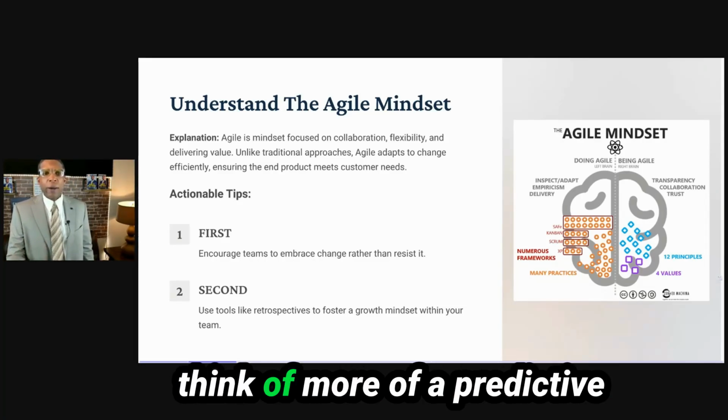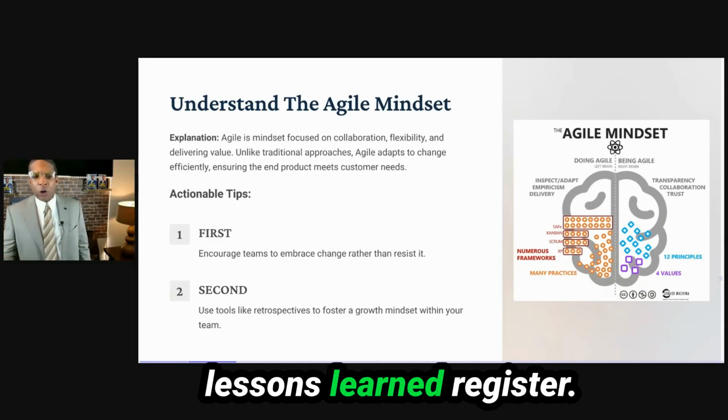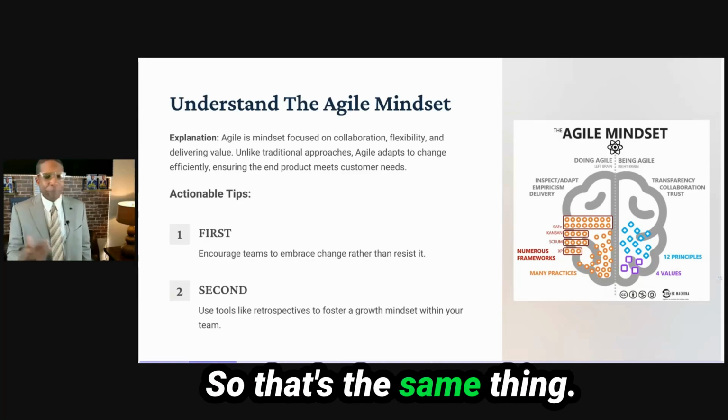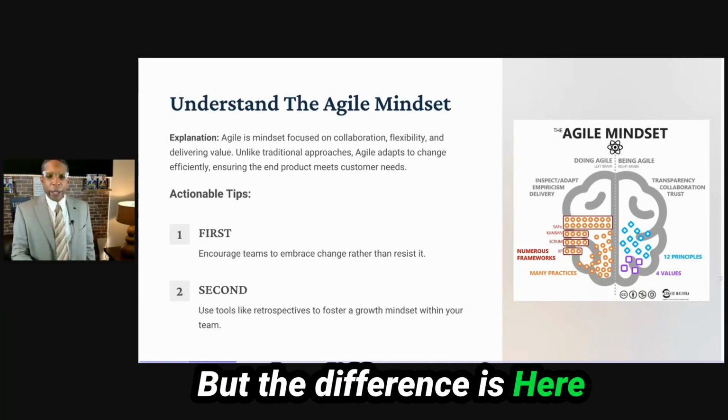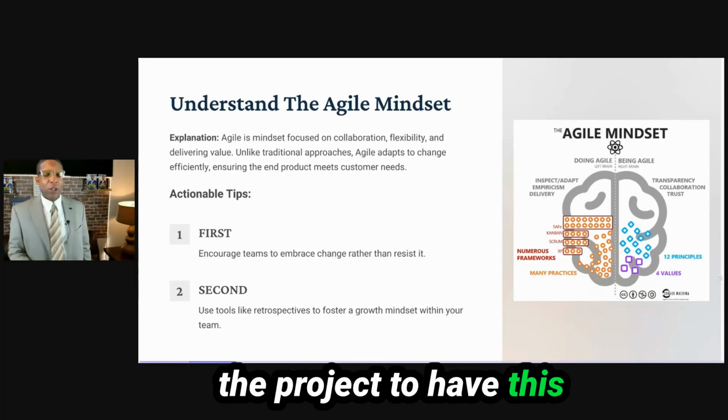Compared to a predictive approach to leading a project, where you think of a lessons learned register, that's the same thing, but the difference is that in the retrospective, you're not waiting until the end of the project to have this particular discussion.